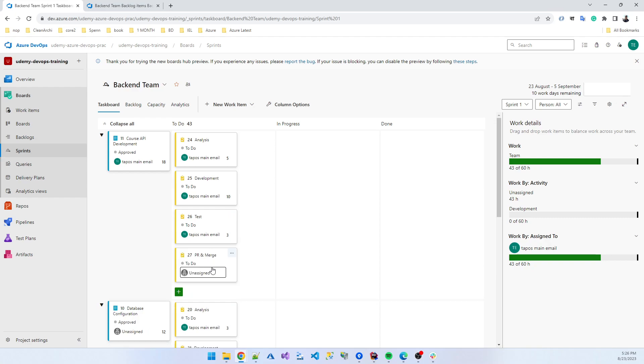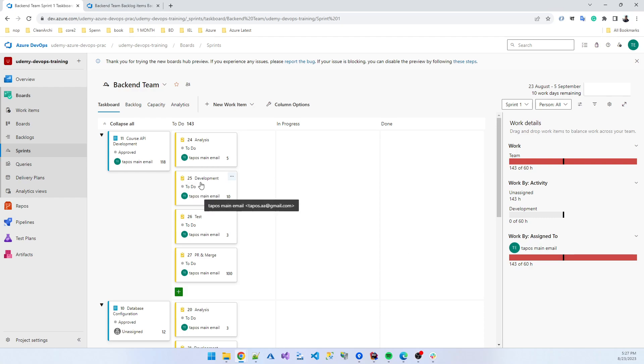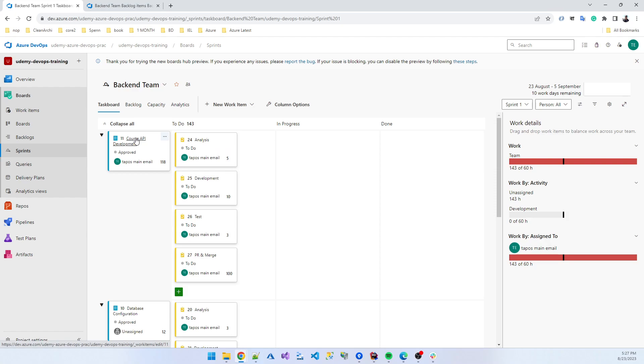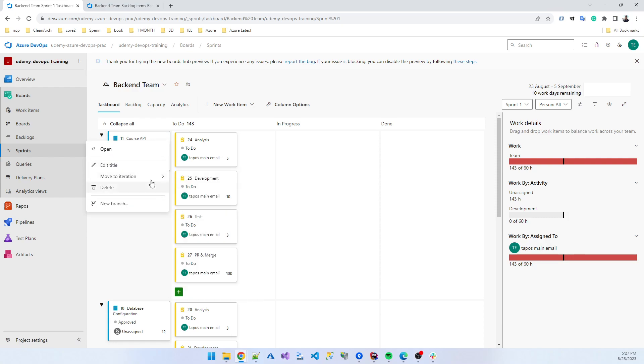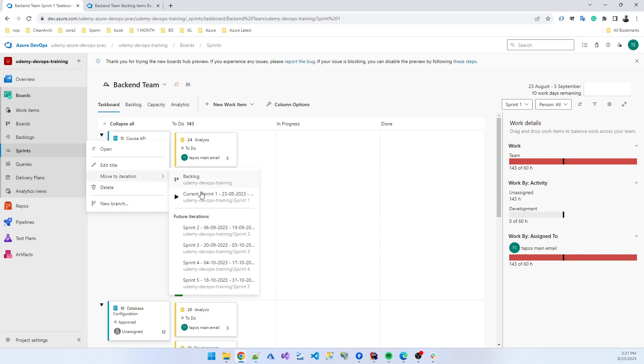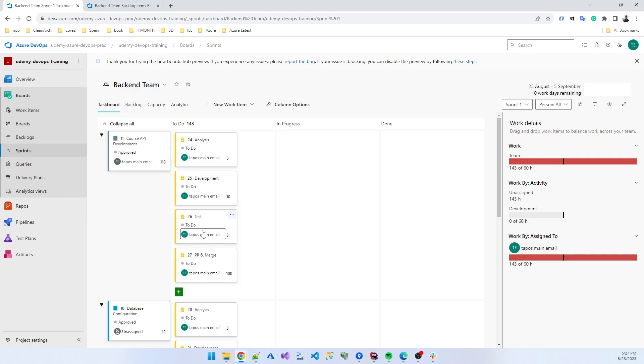If I added some tasks more than my estimation, I want to show you what happens. Suppose I added 100 hours, then you see I am now in overwork, item added in my sprint. So after the sprint planning meeting, if your team lead or scrum master assigns you some more jobs, after estimation if you see that you are getting more and more jobs that is not possible to complete in your given estimation work item, then you need to move this to the next sprint. So how can you move to the next sprint? Click this item, move to iteration, and move to sprint two. So now you refresh this.